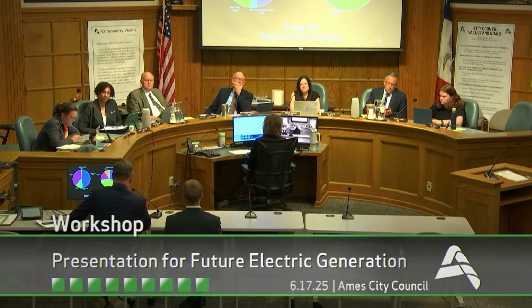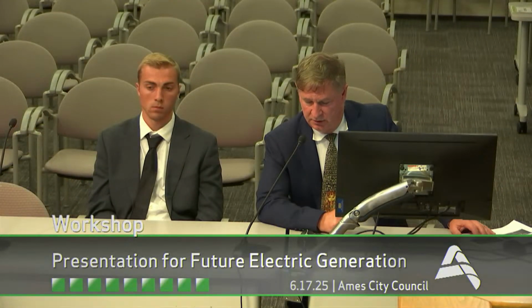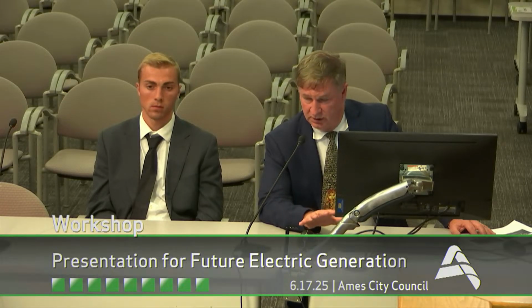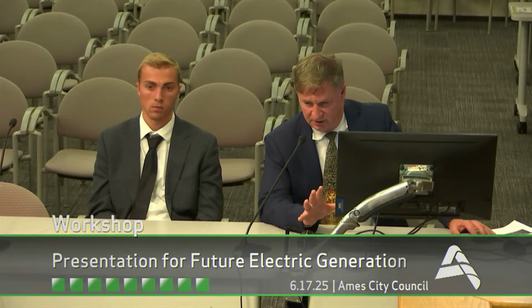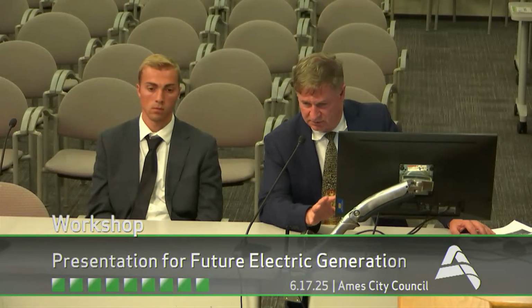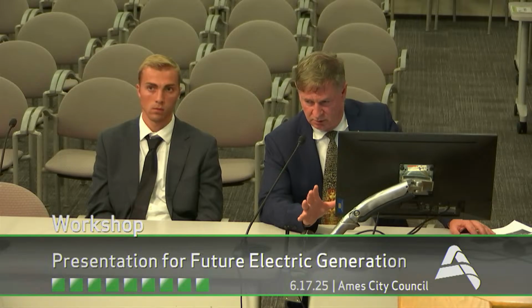Good question. All right. So today in the existing power plant building that we're talking about, we have a retired Unit 5 sitting in there, a retired Unit 6, and then we have operational Unit 7 and operational Unit 8. So for sure, as a minimum, we need to continue that building through the useful life of Unit 8. Now, I think, Gloria, what we're looking at for the RICE units are not to be put right now in that building. There's so much 1950s, 1960s, 1970s, 80s, etc. stuff in there. We would spend more time tearing out existing stuff to fit RICE units in there. So the intentions are to go to the coal yard, start over, do it right.